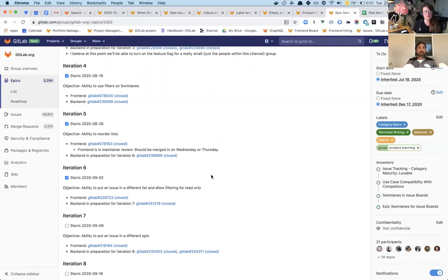I don't think we do a good enough job of, after the first dependency is cleared out, going to all the other issues and updating them and saying, hey, this is not blocked anymore, we can work on this now. We probably need to figure out a better way of making that visible, or letting people know that this thing is no longer blocked. But in general, I think we do a pretty good job of using that widget.